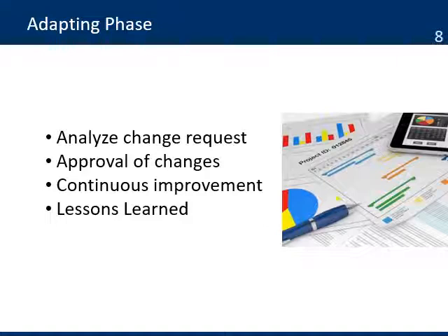Put in place a good process to approve the changes. Depending on the level of authority in a project, you as a project manager can have some authority to approve some of those changes, and then you might need to go to the project committee, the donor, or the board to get approval for major changes, especially if the changes are going to have a significant effect on the design and budget of the project.